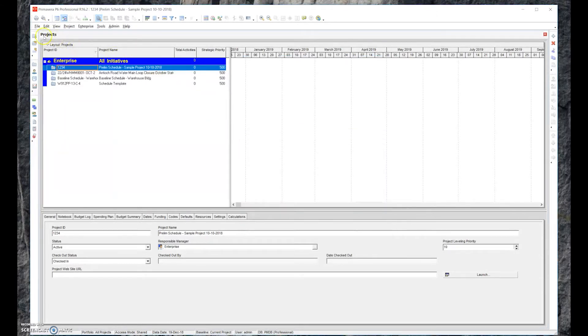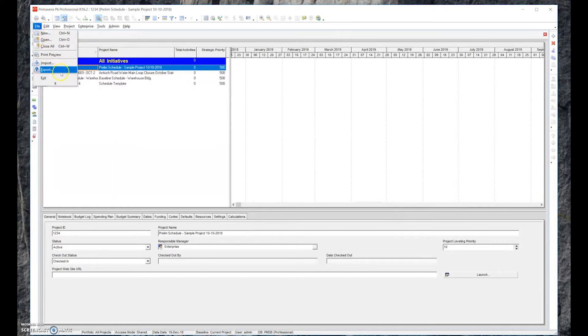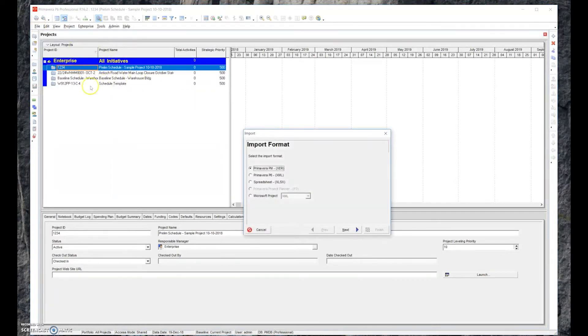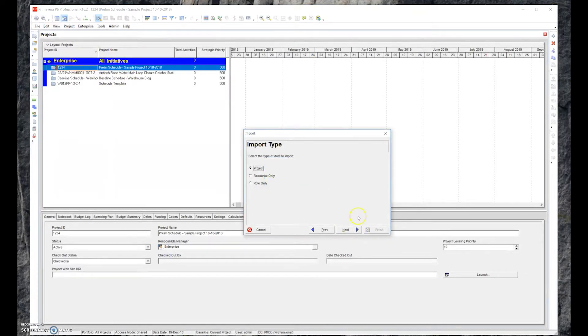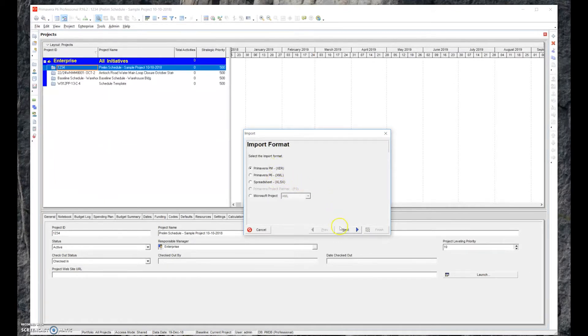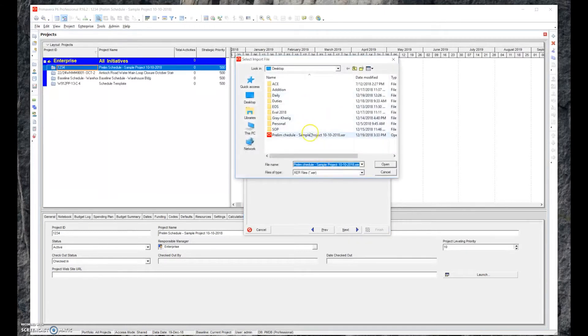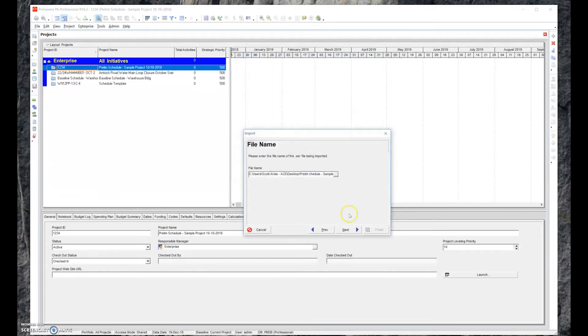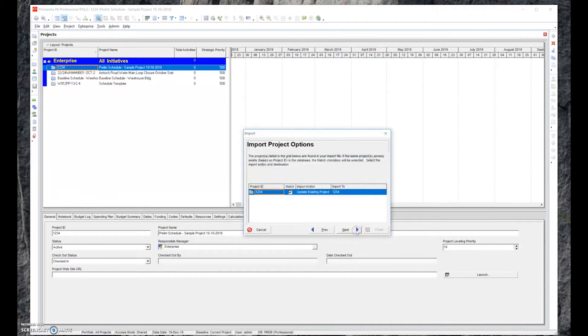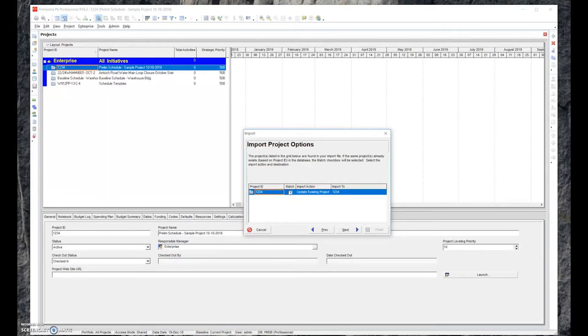Now you notice that if I want to bring it in later, I'll just go File and Import. It's still there, still in the database. But if I want to bring it in, I'll hit Primavera Project. I choose the type here, an XER file. I'll say I want the project. I will click on the three dots here and say that's the project that I want to bring in. Then we'll just hit Next. And we want to match the existing. If you're bringing in a schedule and you want to basically match existing what you had working in there, we can just hit Match.